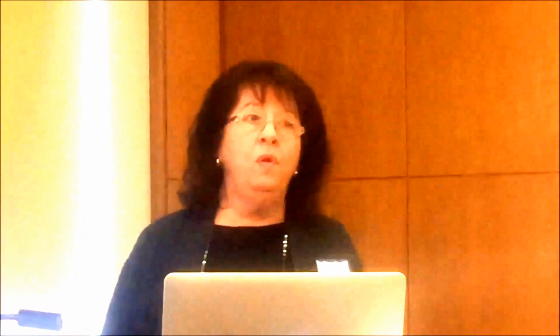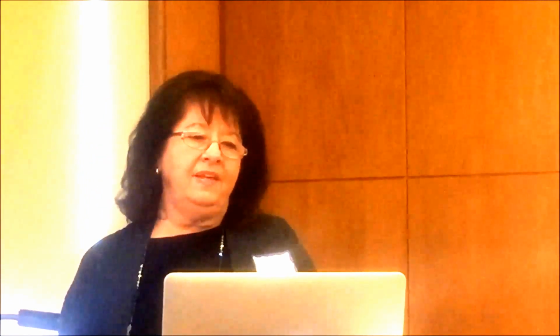we still struggled in wave 2. As I mentioned, our budget anticipated a drop off in resources after wave 1. However, there was a lot of effort for wave 2, a lot of customizations, and it was actually more than we thought it was going to be. We also had a lot of work that was deferred from wave 1. One thing I didn't mention is that we moved to the cloud in the middle of wave 1, which caused some headaches for us, and some work was deferred. But it was only deferred, it wasn't taken off the plate completely.